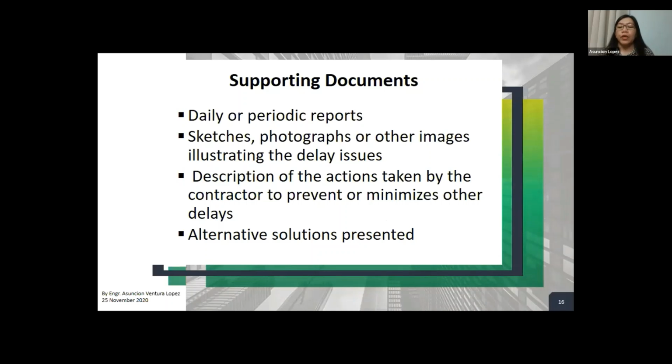However, the daily report is very important. It could be a daily report sheet. It could be a logbook, a journal. You may also include the equipment logs, the labor logs. It will be very helpful in determining the chronology of events, the progress of the work, the manpower and equipment at the site, the weather. Make sure that it is regularly kept daily, okay?